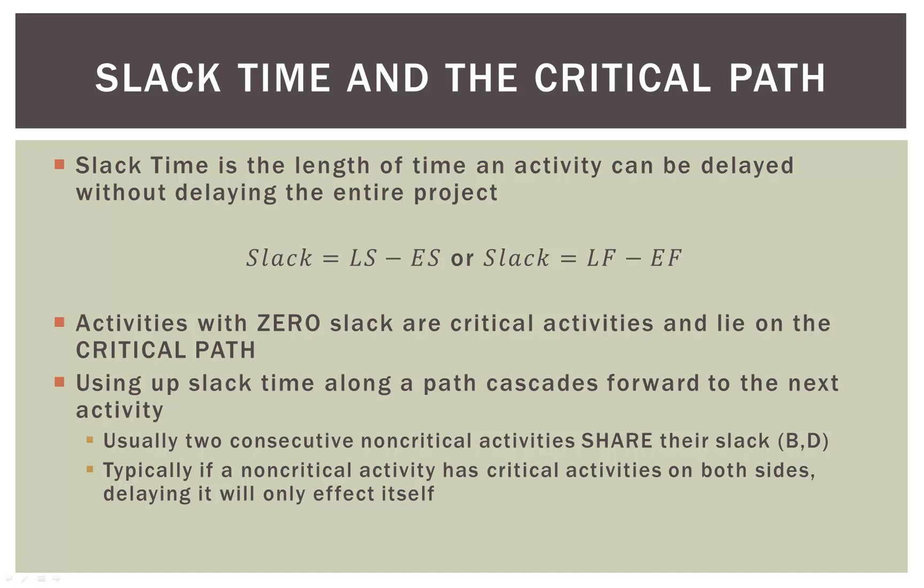Now if a non-critical activity — meaning it has slack — has critical activities with no slack on both sides, delaying it will only affect itself. Some activities are kind of islands by themselves, with a critical activity on one side and a critical activity on the other, so the slack in the middle activity only affects itself and it could potentially be delayed quite a long time. All this will make more sense when we actually do the diagram in the second video.